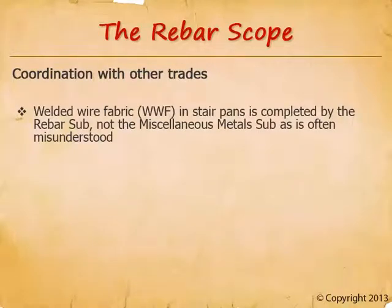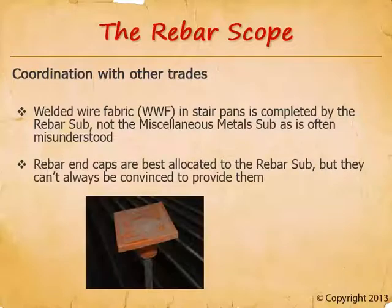Welded wire fabric in the stair pans is completed by the rebar subcontractor, not the miscellaneous metal subcontractor as is often misunderstood. We can't tack the welded wire fabric into place in the shop because when the stairs show up on site, we want to lay two-bys in the pans for construction use, and the welded wire fabric would be in the way. The welded wire fabric is a rebar product, but it might only be found in the metal stair specification — not always on the stair details. The miscellaneous metal sub will exclude welded wire fabric as standard practice, and because rebar subcontractors don't read the metal stair specifications, this commonly becomes a scope bust. Rebar end caps are best allocated to the rebar subcontractor, but they can't always be convinced to provide them — sometimes their insurance company prohibits them from taking on this responsibility. The important thing, as always, is to be sure they're covered but not double covered.